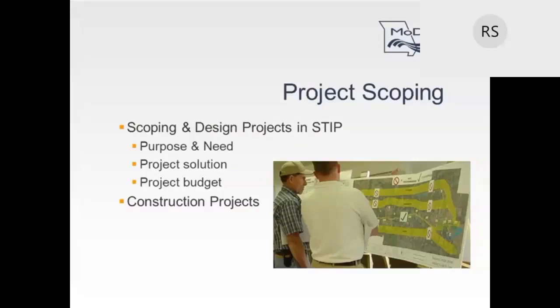These projects are not a public commitment to construct or implement the improvement. This is a planning tool that allows MoDOT to get started on the work of a project before we make a public commitment. Once the project is added to this section of the STIP, the district can start scoping the project with internal staff or hire a consultant to identify a solution for the purpose and need of the project.